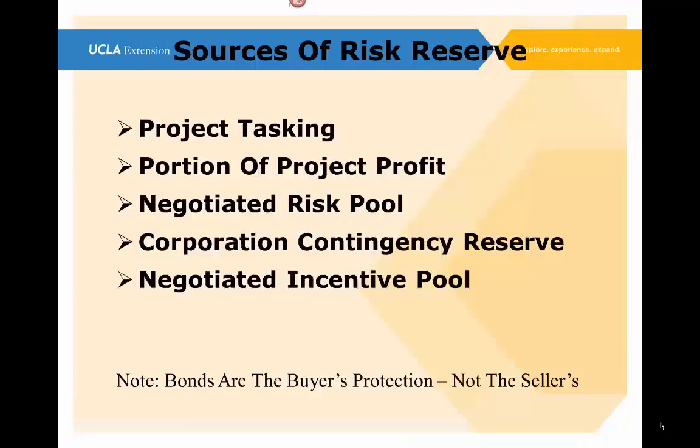When we talk about risk reserve, how do we get it? Where do we get the cost from? During the planning cycle, when you're setting up your budget submission for the project cost, you can also ask for, request, and certify support for the fact that you need a risk reserve set aside that will be used for the risk on the project.